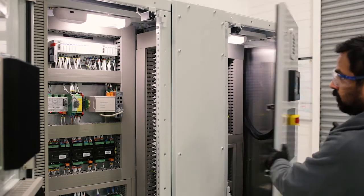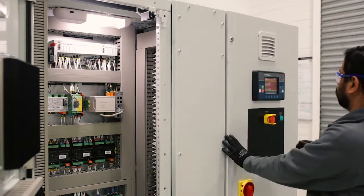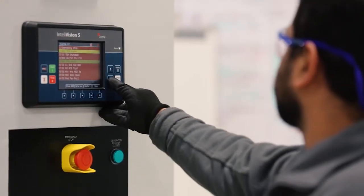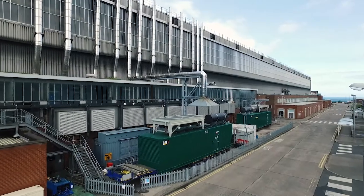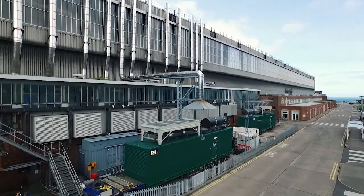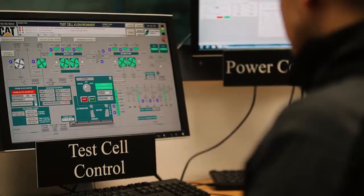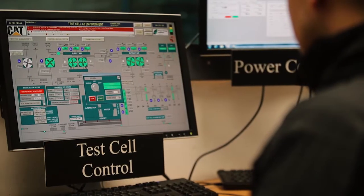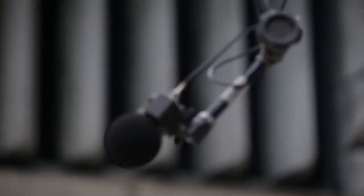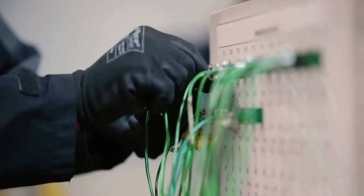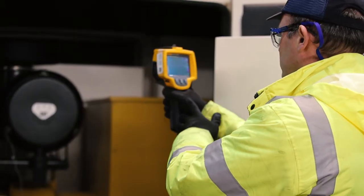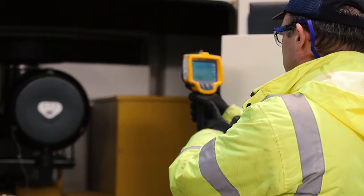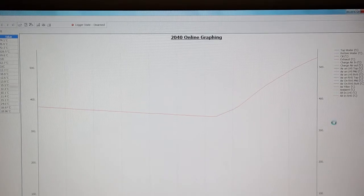We offer peace of mind through simulation of protection alarms and shutdowns, load-proving tests at high and low voltage, cooling system performance, noise, vibration and a full range of special electrical tests and fuel consumption monitoring.